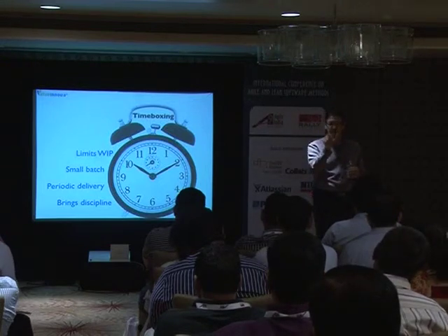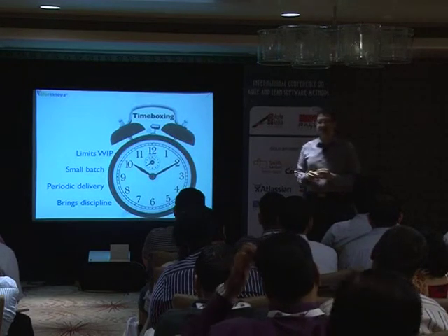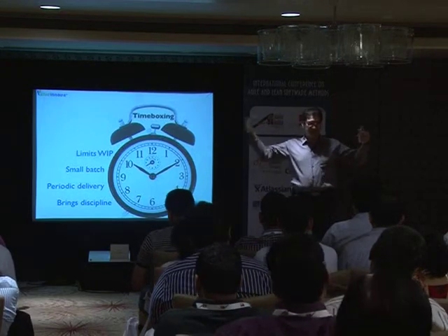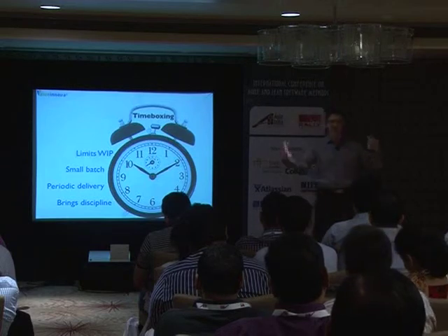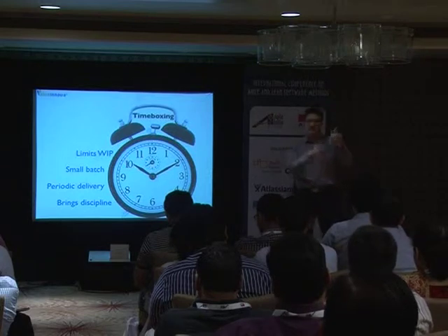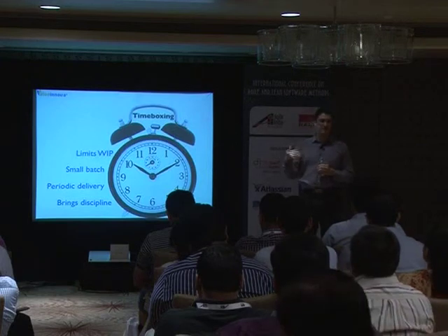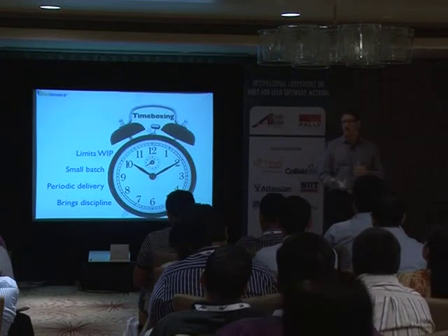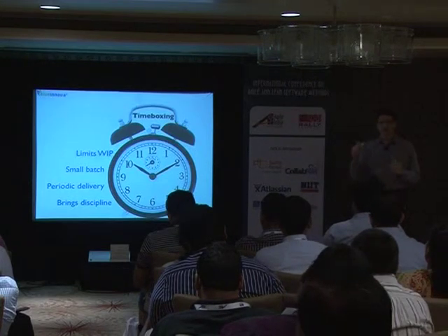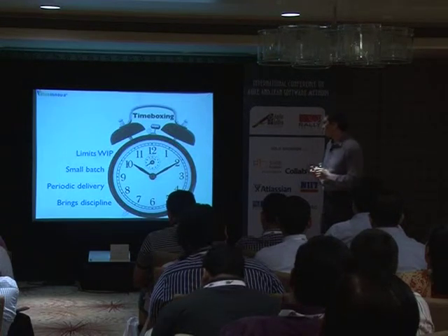That number of tasks that we have is a WIP limit. Why? Because I'm saying this is the maximum number of tasks that I'm going to work on during this sprint. Yes, we don't have WIP limits anywhere else, but the entire Scrum structure has a WIP limit. And of course, something interesting in this case is that the WIP limit changes sprint after sprint, because what we keep fixed is not the WIP limit, it's the velocity. However, something that is important with the time boxing approach is that we have a WIP limit, okay?